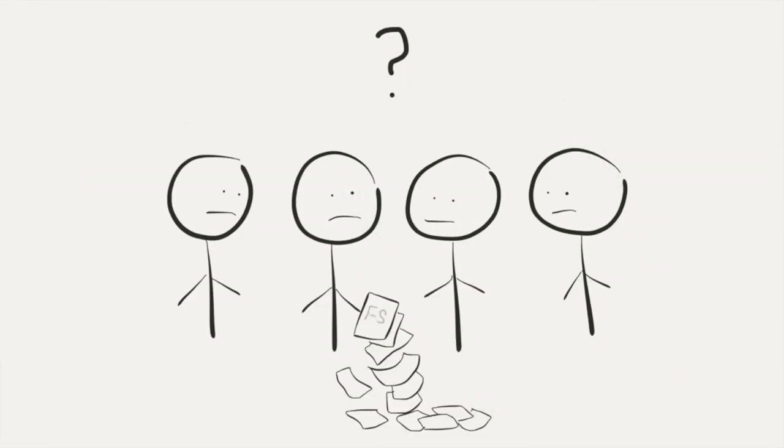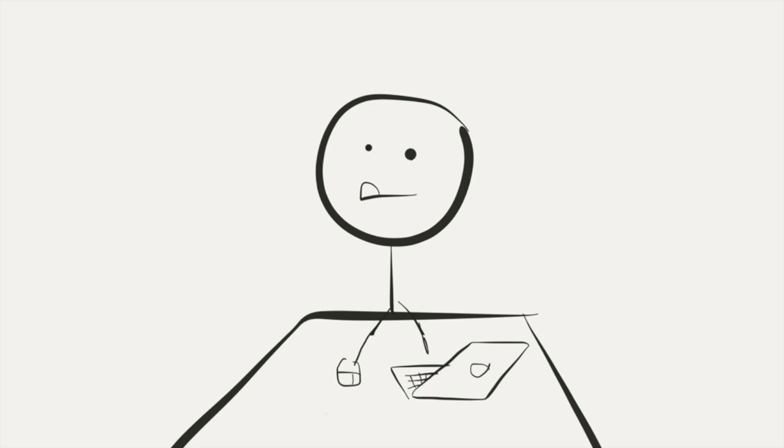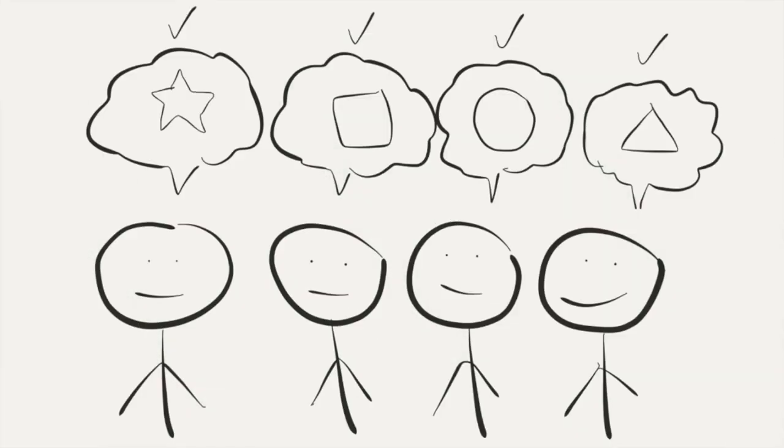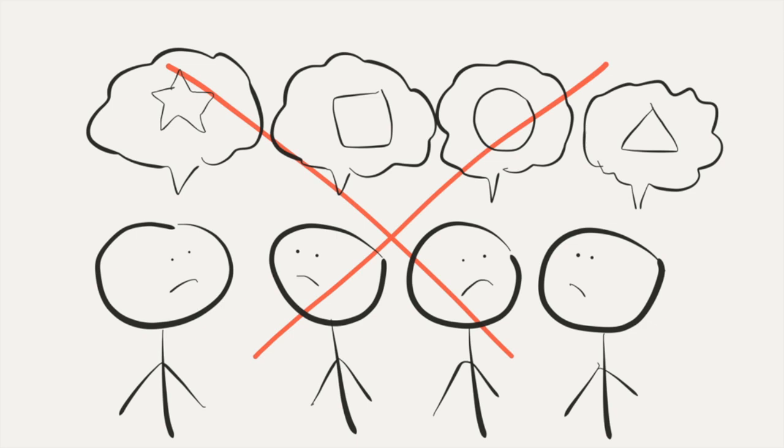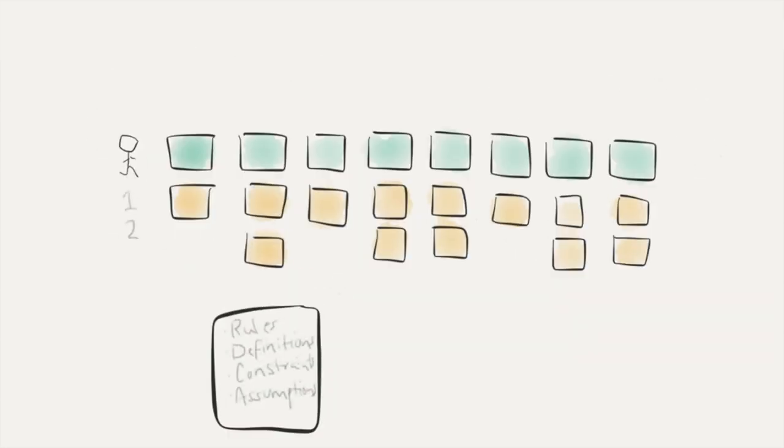Functional specifications almost never tell the whole story of who the feature is being built for and why. A functional specification is typically created from only one perspective because it is typically written by only one author. The author's mind is capable of filling in the details that aren't written down, which can prevent them from detecting what could be missing from the document. Ten project team members can interpret a functional specification ten ways, and all still sign off, believing they are in agreement. What happens to our functional specification?